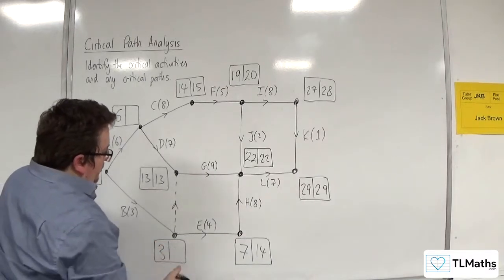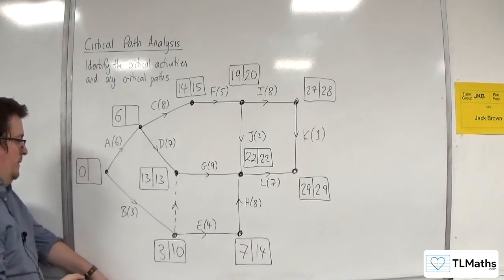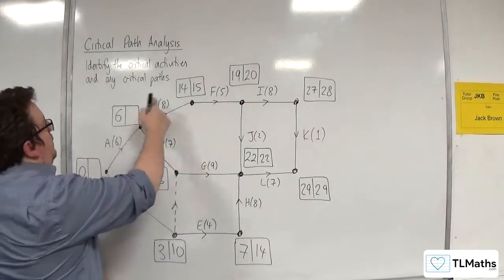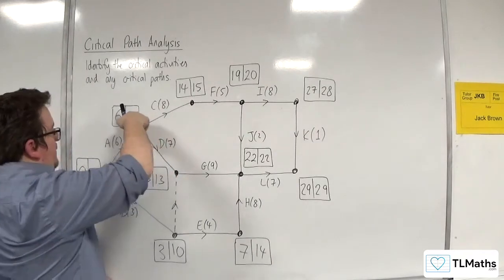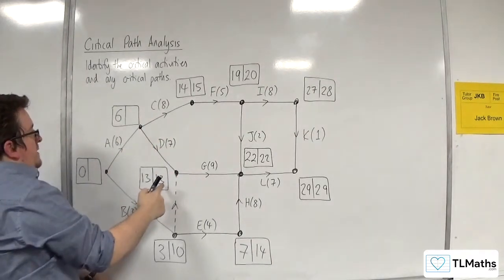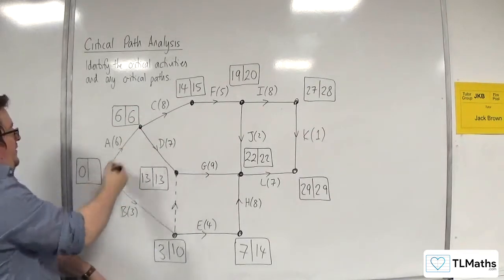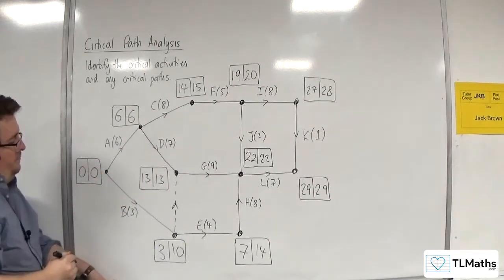So we take the smaller of those, so 10. Then for this one, we've got 15 take away 8, so 7, or 13 take away 7, which is 6. Then 6 take away 6 is 0.